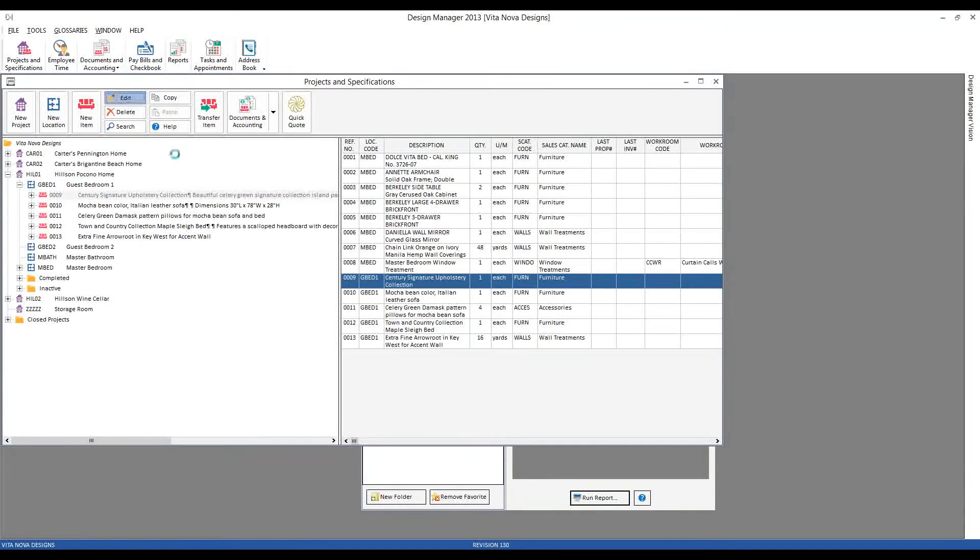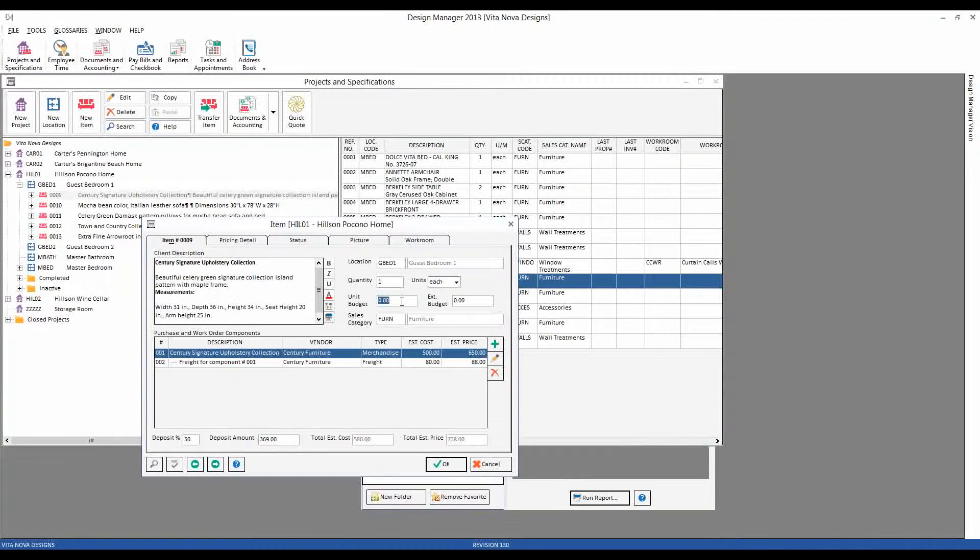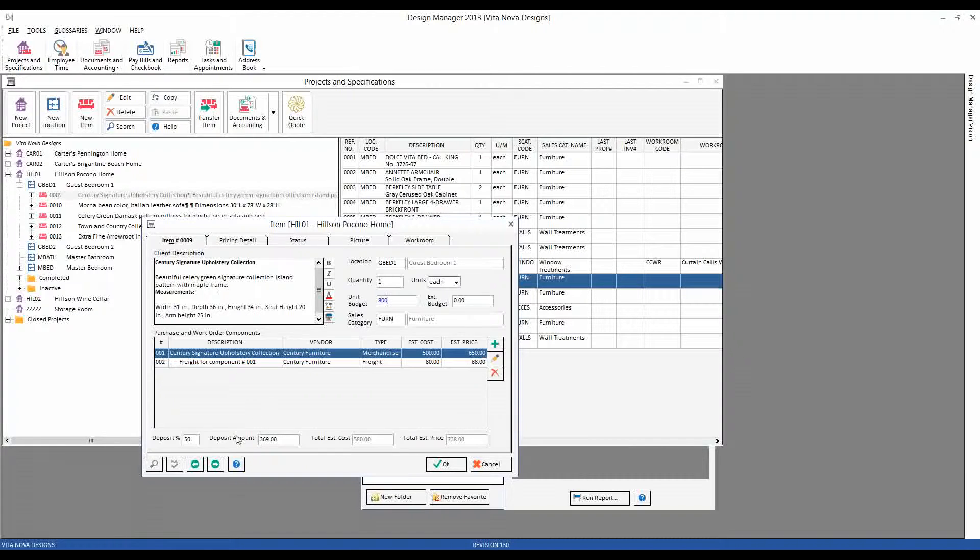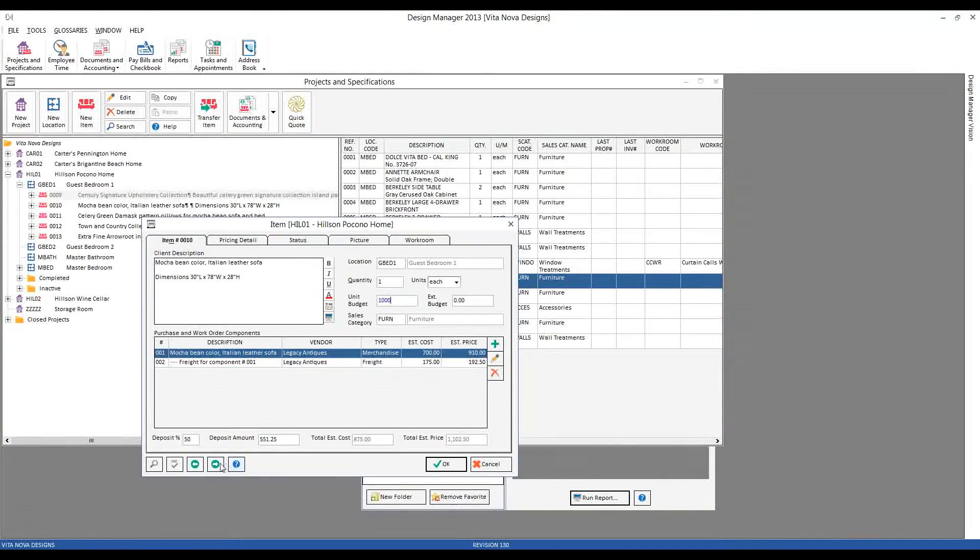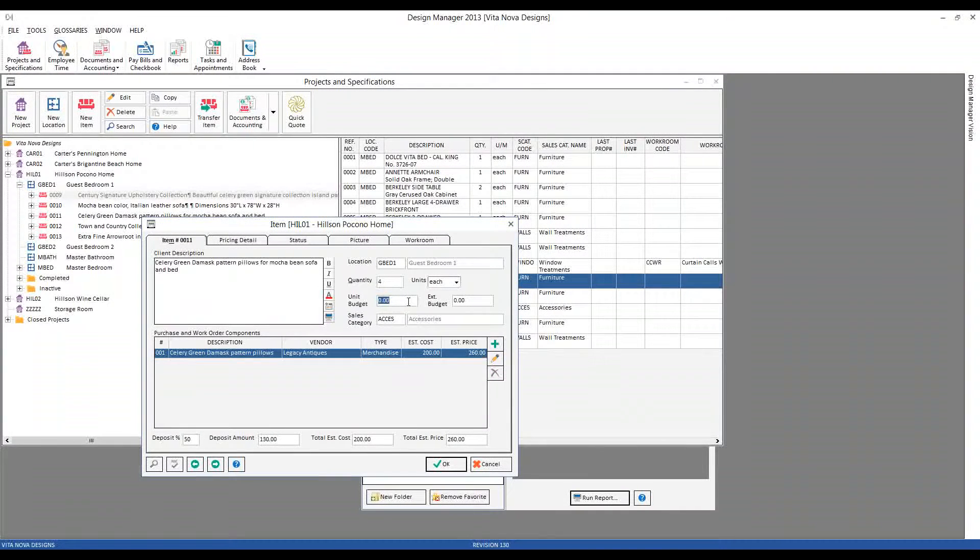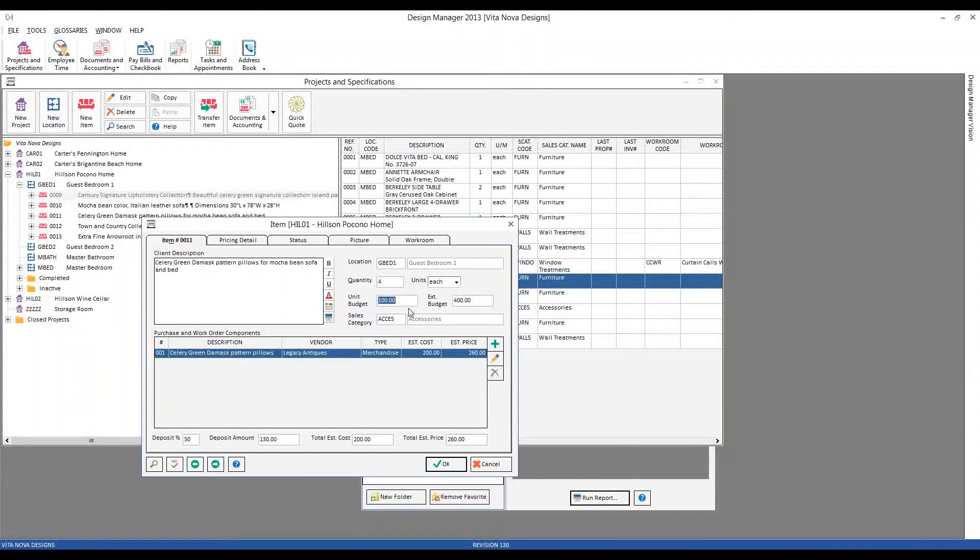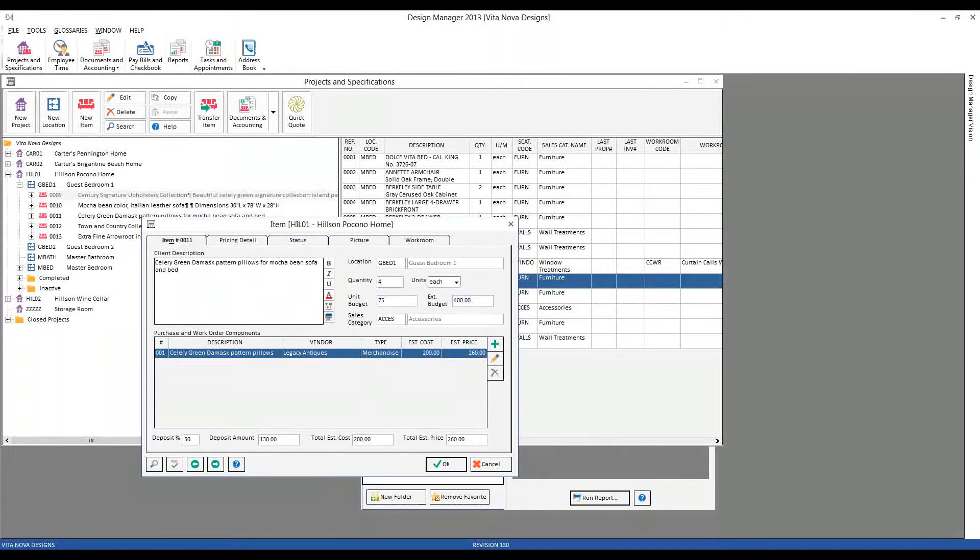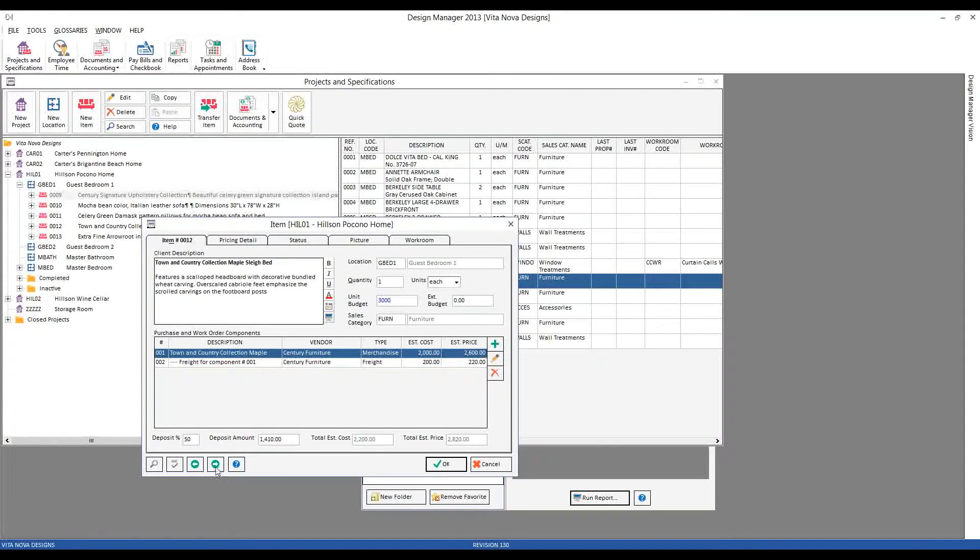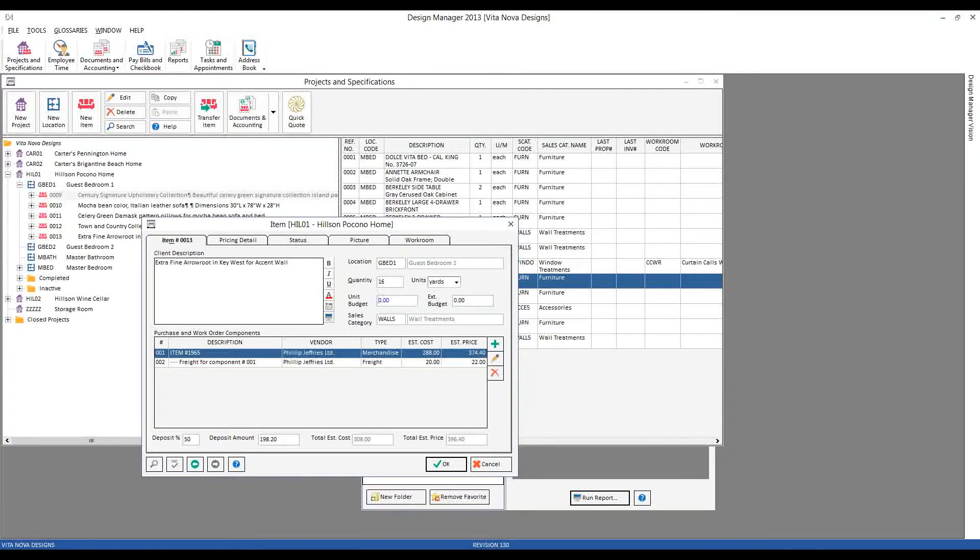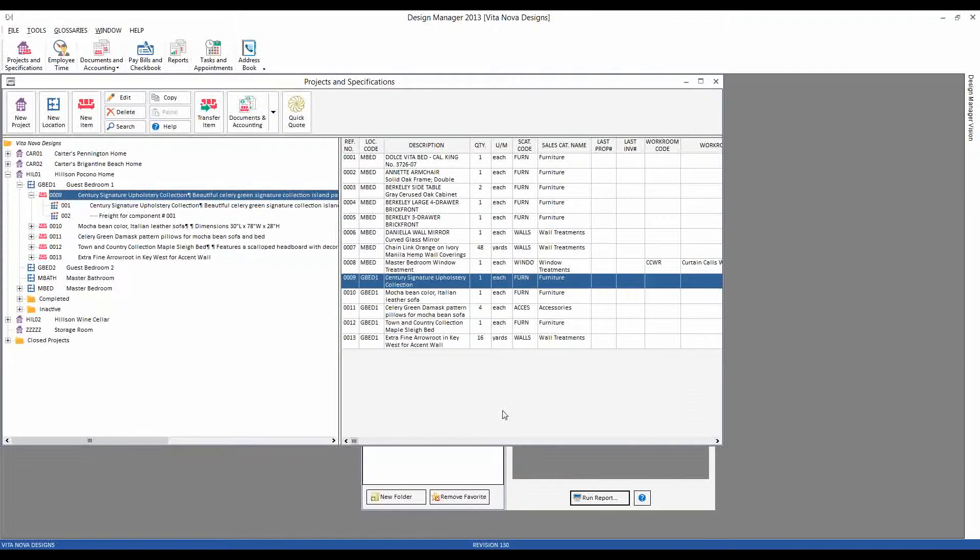Let's go ahead and edit our items, and we'll actually input the individual item budget on the item window into the unit budget field. So let's say we add $800 for the unit budget of our island pattern. Let's say we have the $1,000 budget for our sofa. We have four pillows, so I could put in a unit budget. And notice that Design Manager automatically calculates the extended budget, and it works in reverse as well. So if our total budget for the pillows was $400, Design Manager would recalculate the unit for us as well. So you can enter into either mechanism. Let's go back to our $75. Now we have our sleigh bed. Let's say that's $3,000. And finally, we have our arrow fabric. So let's put $22 per yard.